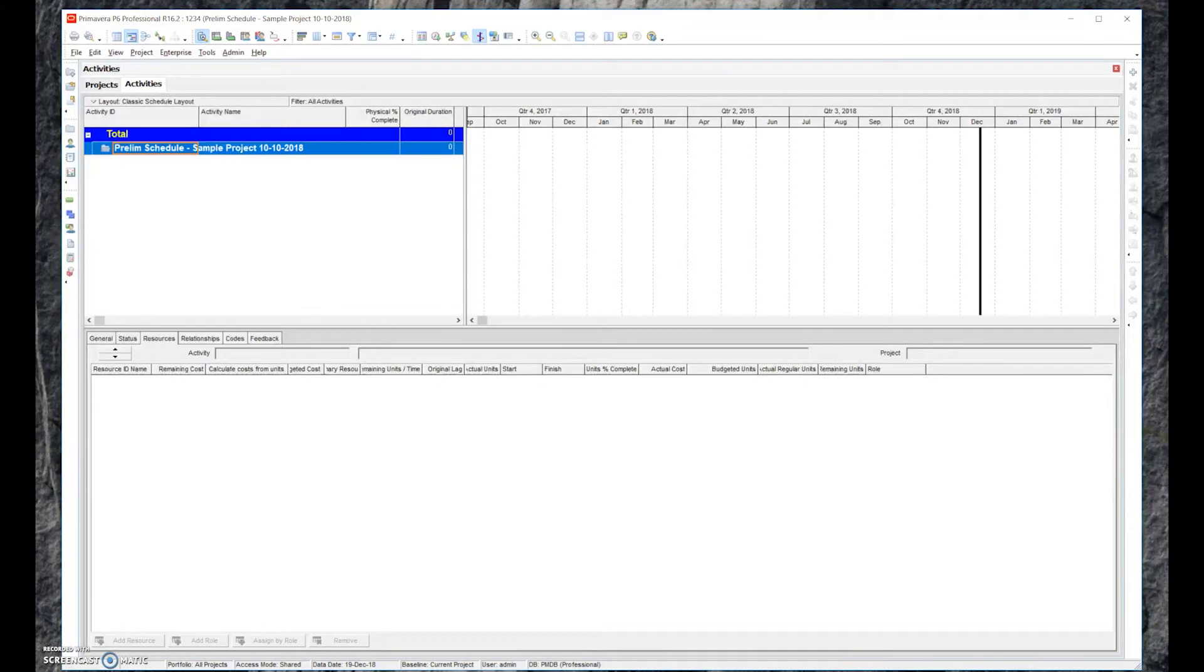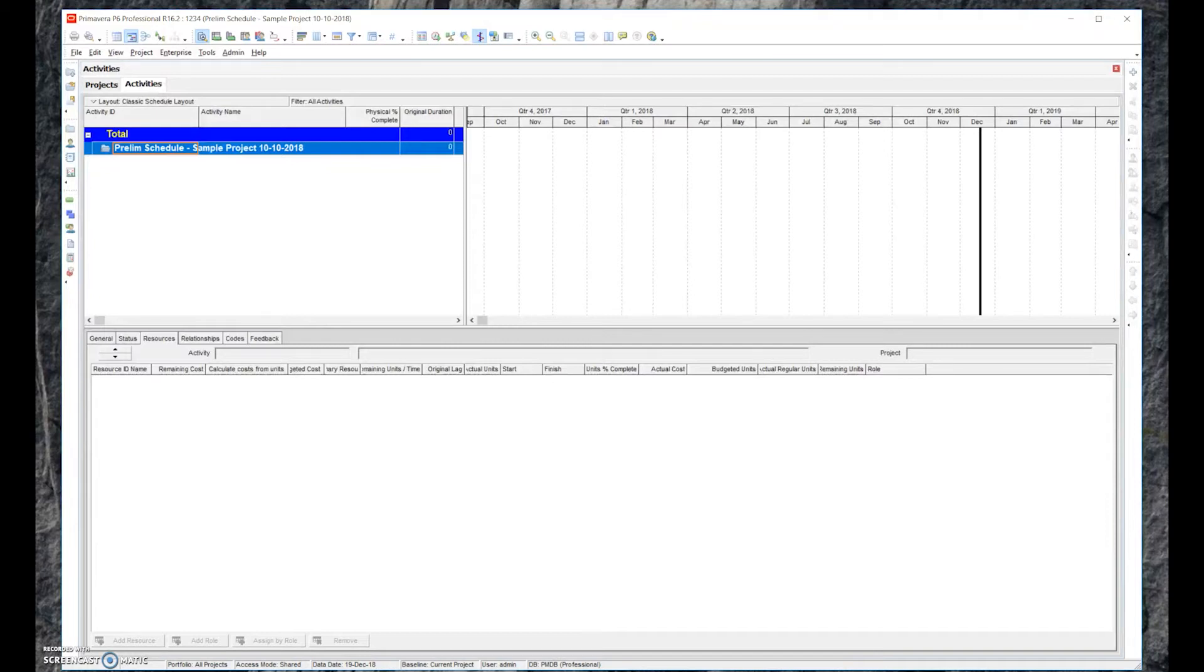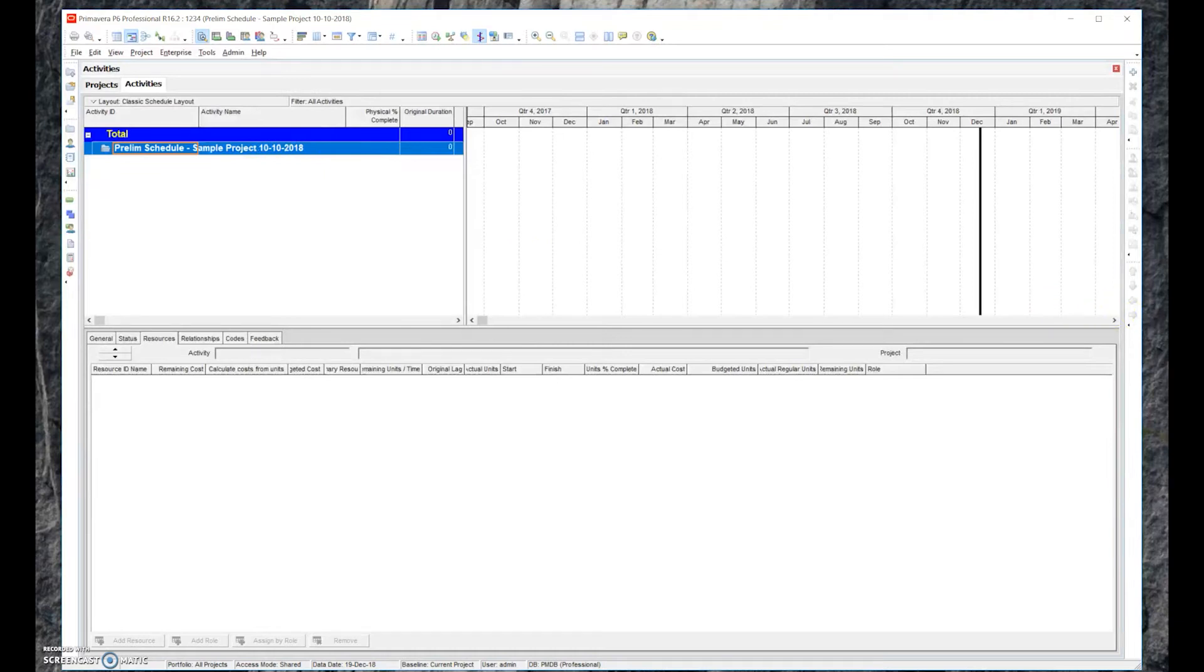We always want to associate a date with the schedule. That helps prevent any kind of issues of overriding an existing file. It doesn't always fix it, but it fixes it nine times out of ten. In this case, I went ahead and named it 10-10-2018.